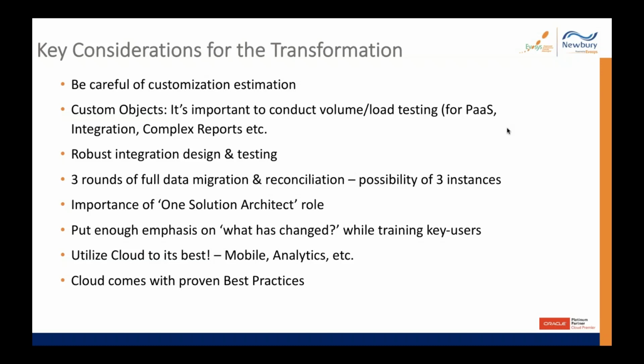It is important to do volume or load testing. You do not have to test the cloud application per se, but your complex reports and your complex third-party integrations, test with full data. Do not just test if your report is working fine. Load all the data and have rigorous testing. It is really, really important. We have observed performance issues if you have not tested in detail. People definitely do system integration testing and user acceptance testing, but they forget to conduct volume or load testing, which is really, really critical.